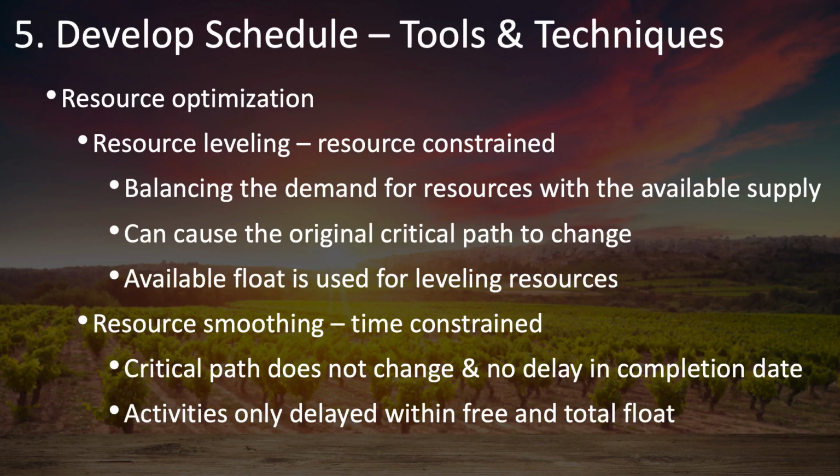In resource smoothing, you are time constrained, and that's your focus. The critical path does not change, and it does not delay your completion date of your project. And you delay activities only within the amount of float you have to work with.